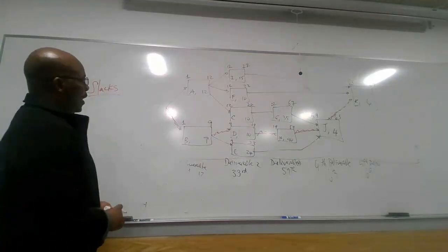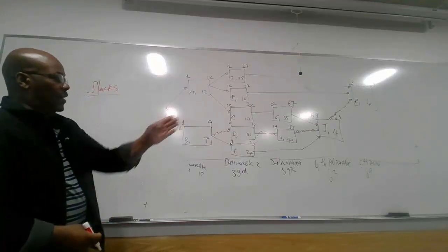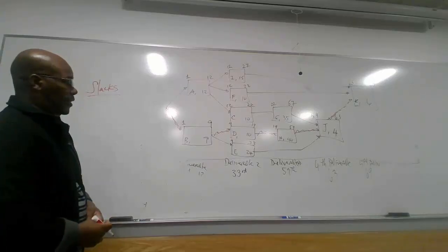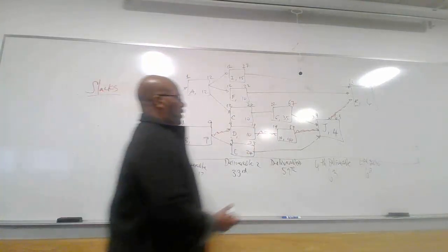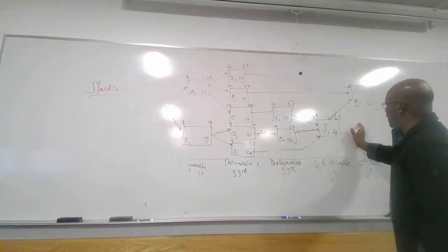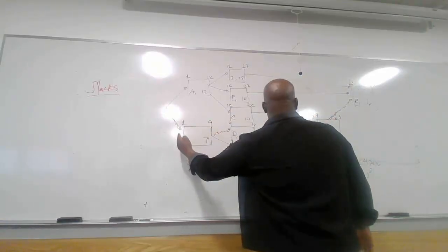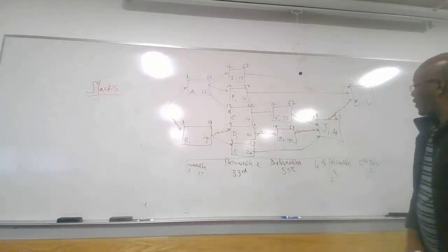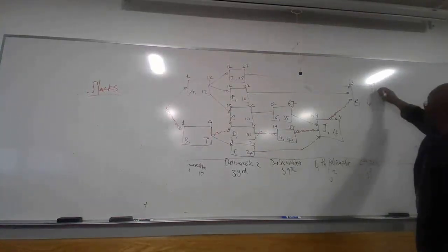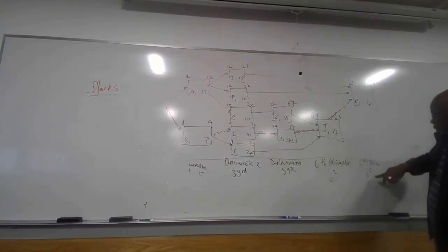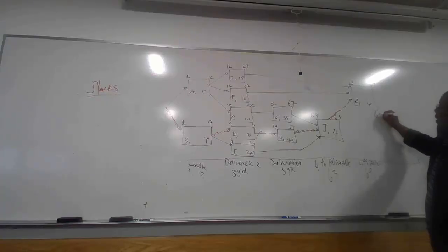And to get slacks is when we find how we can delay some of the activities. Still, we can maintain our 69 days, weeks to complete the project. And to get the slacks, we should start from right to left versus starting from left to right. So we're going to start with K and see how many weeks can we delay this activity. Still, we finish the project within 69th week. So that means we cannot delay anything here.